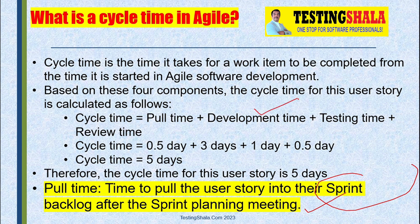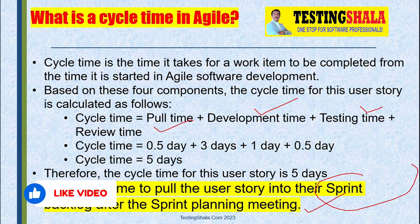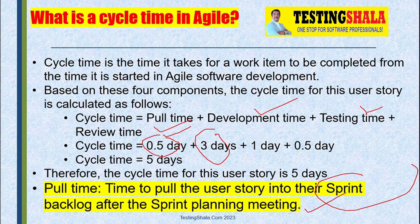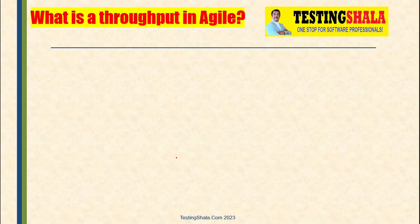For example, pulling the user story from the backlog takes about half a day, sprint planning and implementation takes three days, testing takes one day, and review takes 0.5 days — giving an overall cycle time of five days.